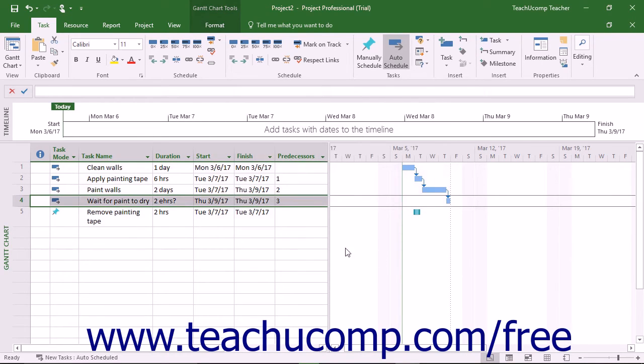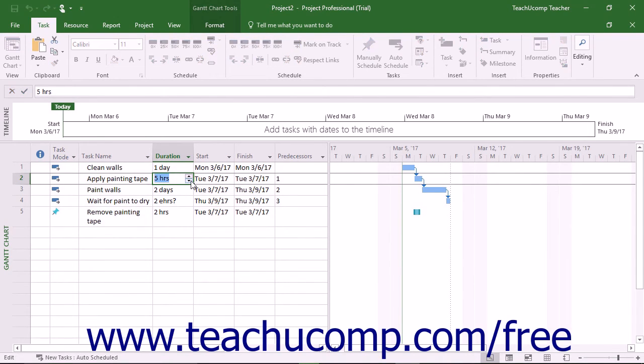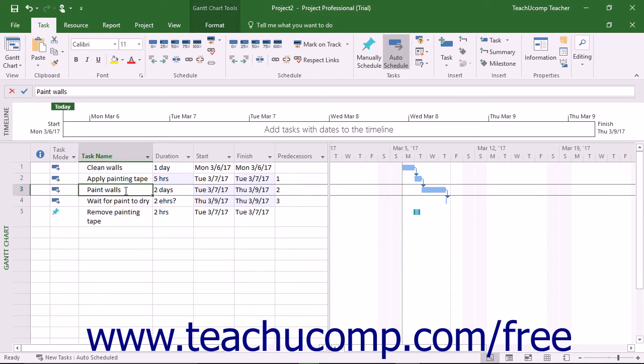If you change a predecessor task's duration, the start times of its dependent tasks may change if they have no specified start time constraint. As long as the New Tasks Auto Scheduled is selected for the Task Creation mode, this will be the case.